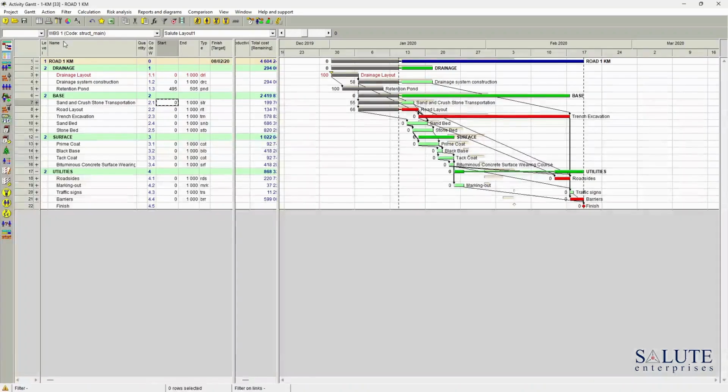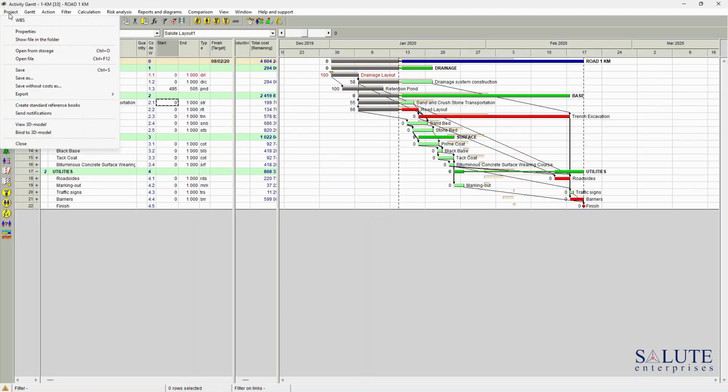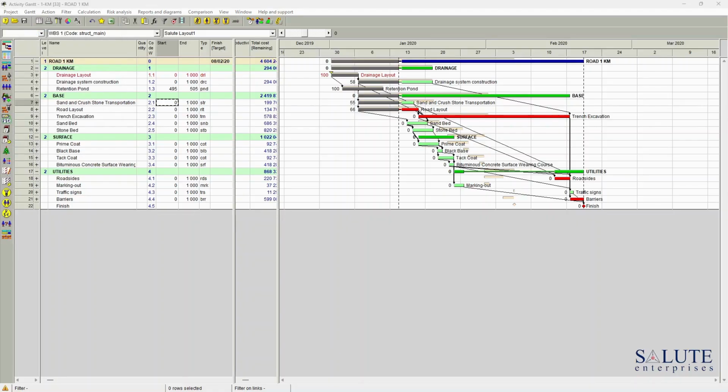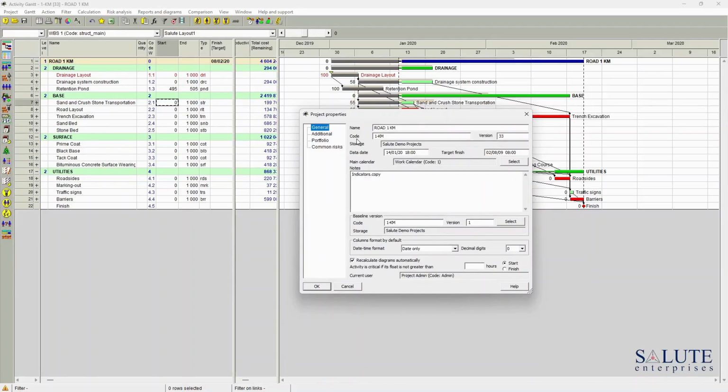And then if you go to the actual project and go to project properties, you can actually see what's your current user of that particular project. So at the moment you can see we are logged in as an admin, and we understand what kind of access we've got in this particular project environment. And that's how you manage user settings, user groups, and access rights in Spider Project.